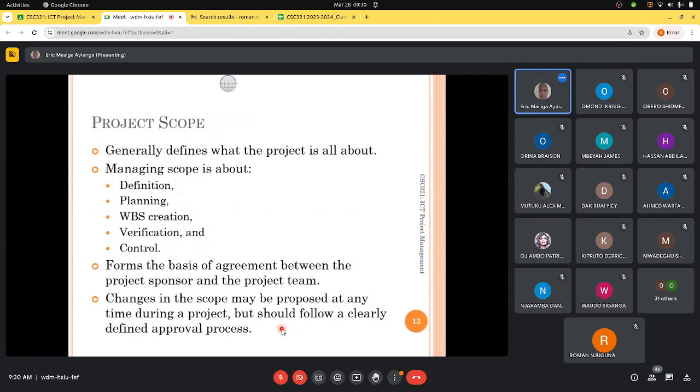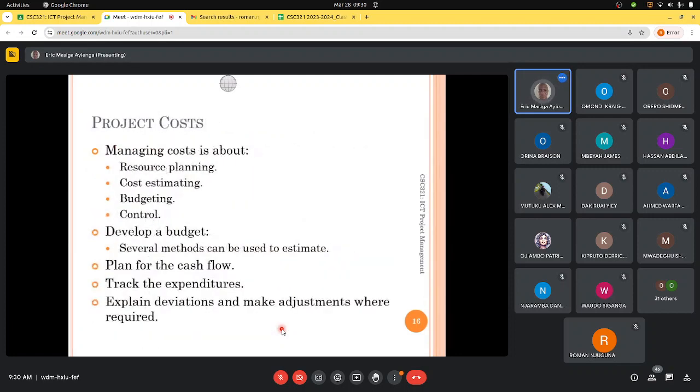So, what is going to happen? You have your work breakdown structure, you have your schedule and Gantt chart, so you know what tasks will make up this project. Now, once you have that bird's eye view, it's possible to estimate cost for each task, and in the long run, to put all the costs for all the tasks together and say what the project will cost.